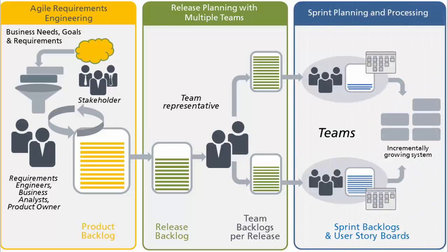Working with more teams means dividing the release backlog between teams. With their own release backlog, each team can carry out their own sprint planning.